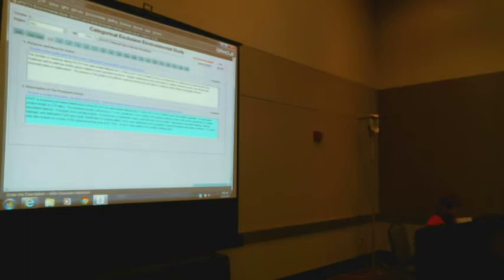So this description also states all work will be limited to the existing roadway prism. If that's true, it's good to put in there, but sometimes we put that in there and it's not really applicable to the project. If you want to define your parameters by toe of slope to toe of slope, edge of oil to edge of oil, that's good. If you want to say we're limited to areas that have been previously disturbed, it's good to have those kinds of clarifications in your project, but roadway prism may not always be an appropriate description for your project. Sometimes it kind of gets thrown in there.